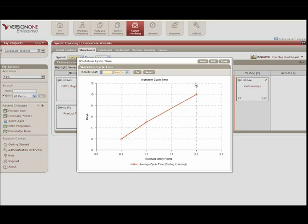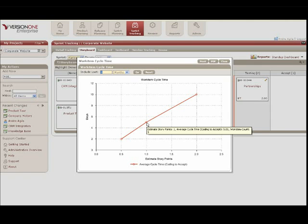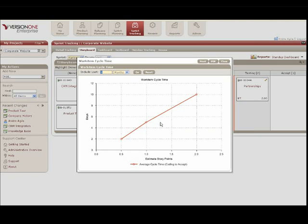There are people in the LinkedIn Kanban community using cycle time to develop a service-level agreement. A 'one' looks like about five days. So we can say: if we estimate a piece of work as a one, we'll pad on three or four days and have a service-level agreement of eight or nine days. That's an interesting way to go if you can get your variation down. What's hidden in this chart is that we might have something that took 12 days that was a one, while the majority took two days — skewing the numbers. I would treat this as a prompting measure — should we drill down? Why is this taking 12 days when everything else takes two days?